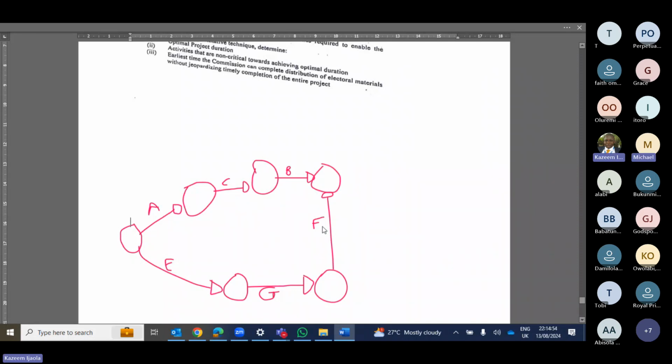I must take my H outside first of all. Now you do a dummy here. Use a dummy first. No. And then you now use. You mean we use a dummy? We'll now connect H. No, you are violating. You violate the rule, sir. Because you are ending an activity, it cannot start from a dummy.